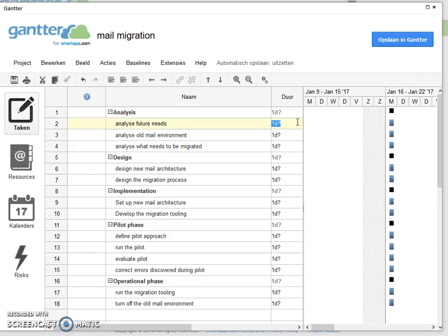So although this might only require one full working day, the duration will actually be quite longer, because you have to follow the possibilities people have with their agenda. So let's say we foresee 2 weeks for this.